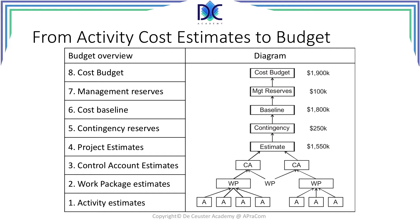How do we get from activity estimates to the total cost budget of the project? When we look at all those activities on the bottom, they are linked to work packages, and from the work packages we create control accounts. All the control accounts together give you the project estimate. What is still missing is the contingency budget to take into account the risk effects, and that gives you your project baseline.